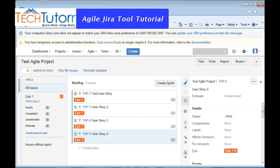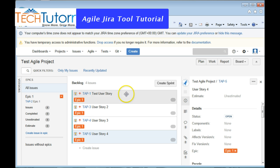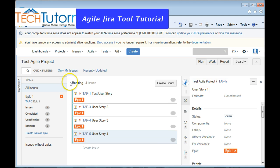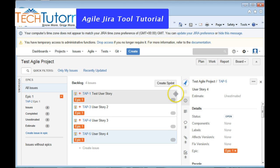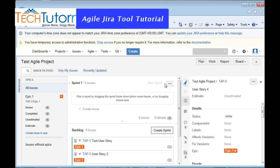So here I have just created a few user stories for the project we have just created. The next thing we are going to see is how to create sprints and associate some of the user stories to the sprint. You will notice that whatever user stories we have created so far have actually gone into backlog, and only once you have your sprint planning meeting and once you create a sprint, you can then start associating some of the user stories to the sprint. So to create a sprint, click on Create Sprint.